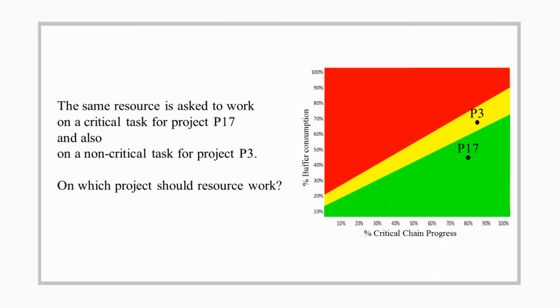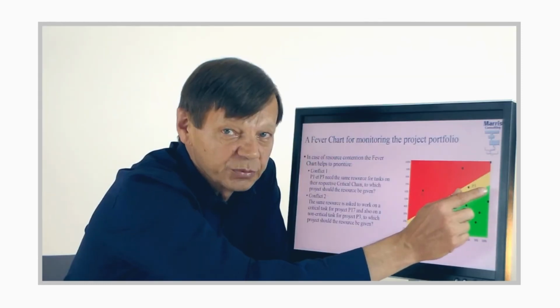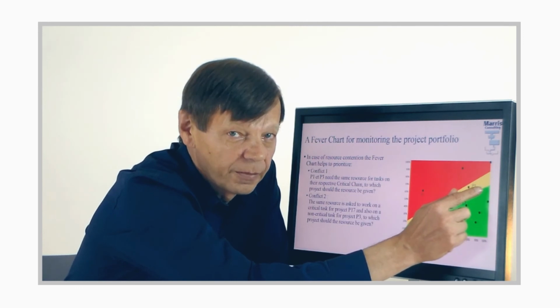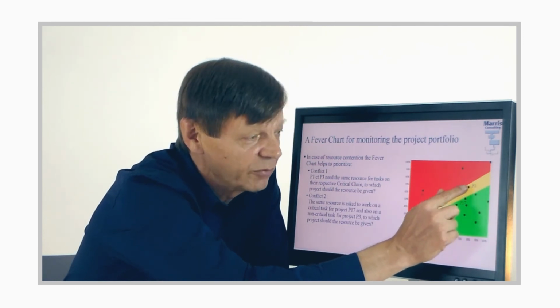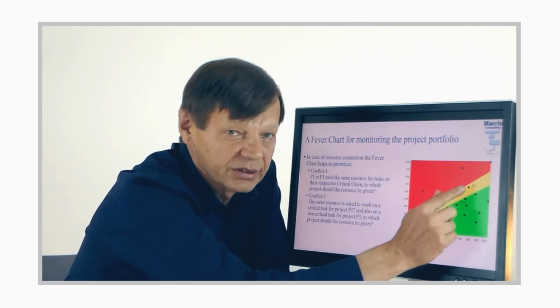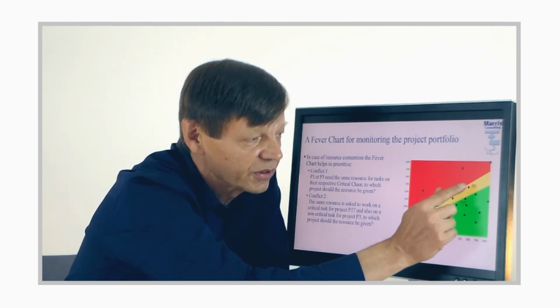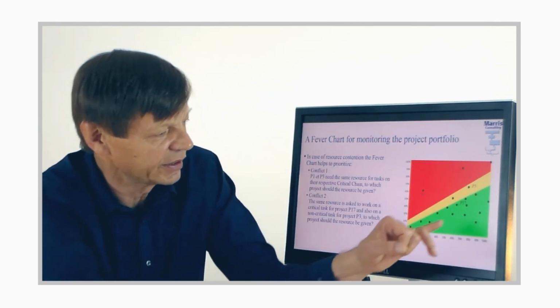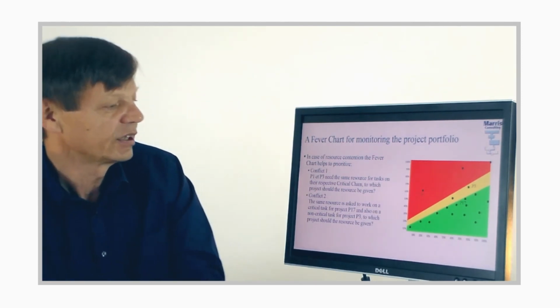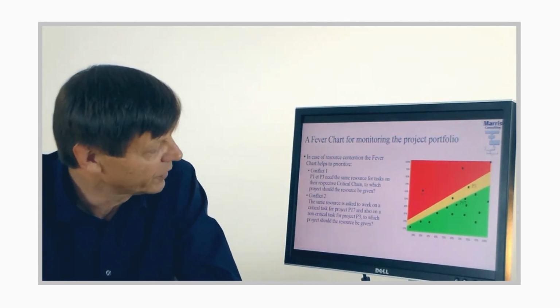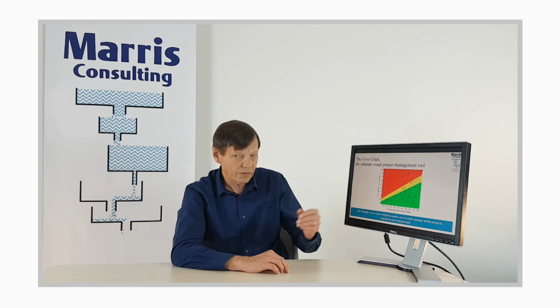We're measuring progress on the critical chain. So that resource could not help that project move forward. Okay? It wasn't actually working on the critical chain, it's working on something else. Right? So there's no point in it going there. It actually has to work on this one. Okay? So that's the notion of critical and non-critical. Be clear. So, to summarize,